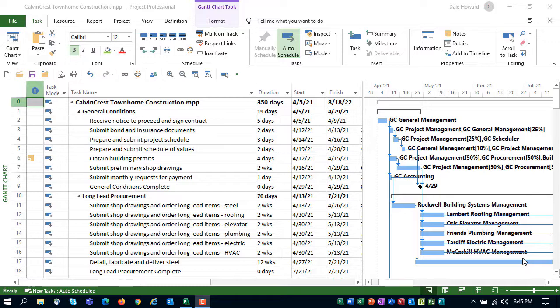In this demo, I want to show you how to use the marked column to automatically format tasks of interest to you. In my particular project, I would like to mark and format every task that has a duration that is 3 weeks or longer. Those are potentially tasks that could slip and impact the finish date of our entire project.